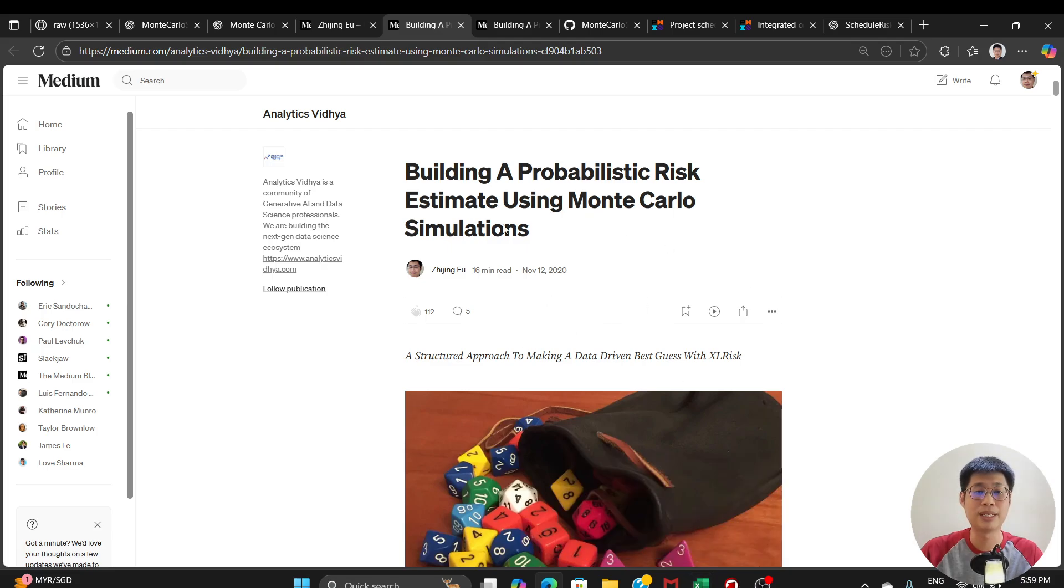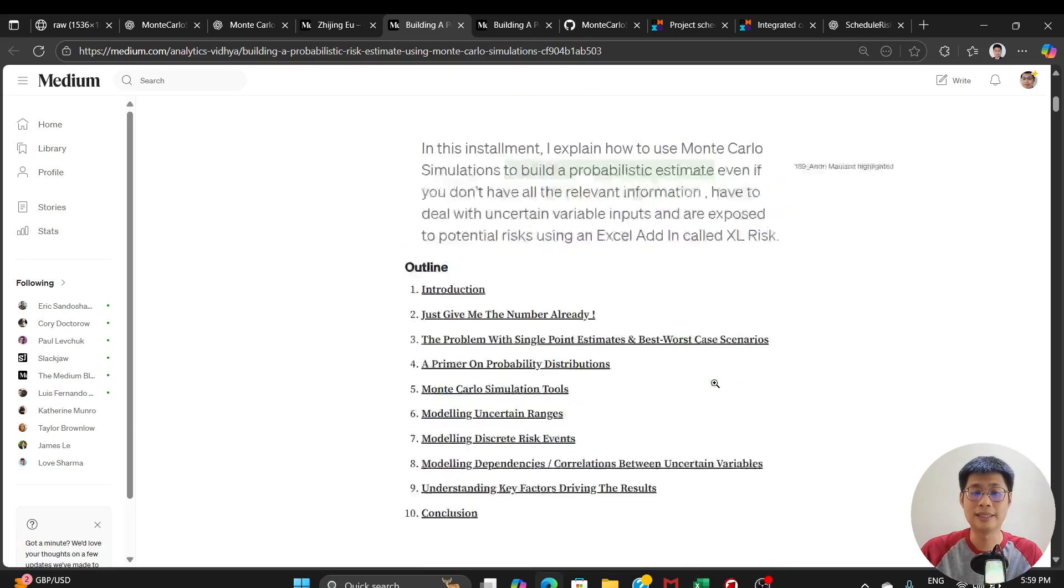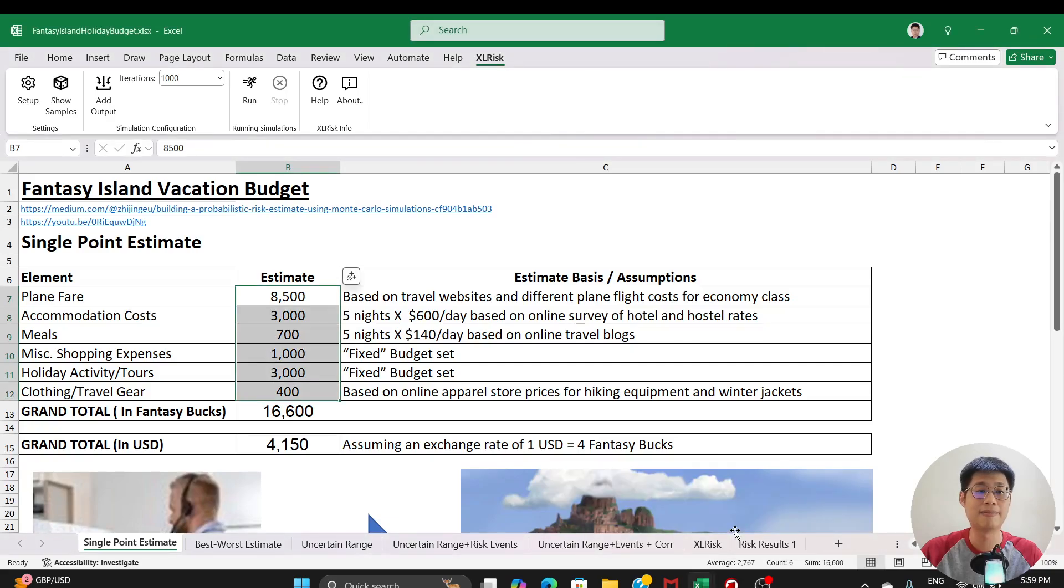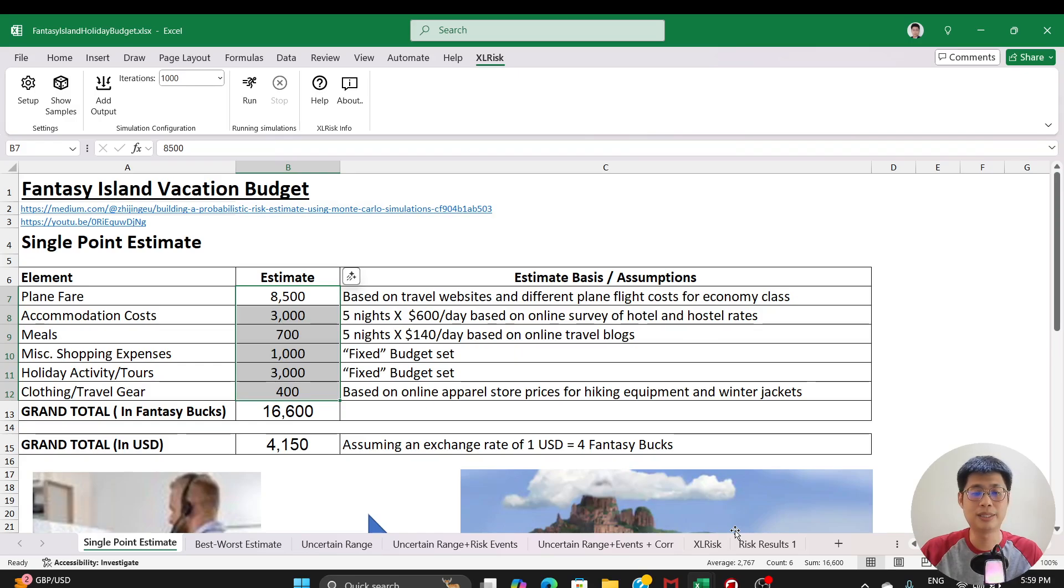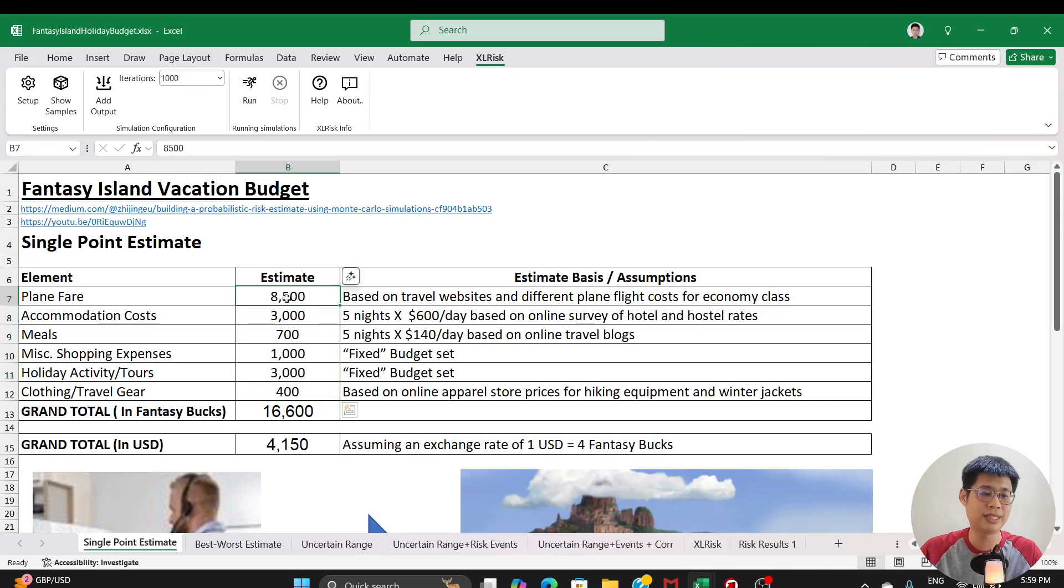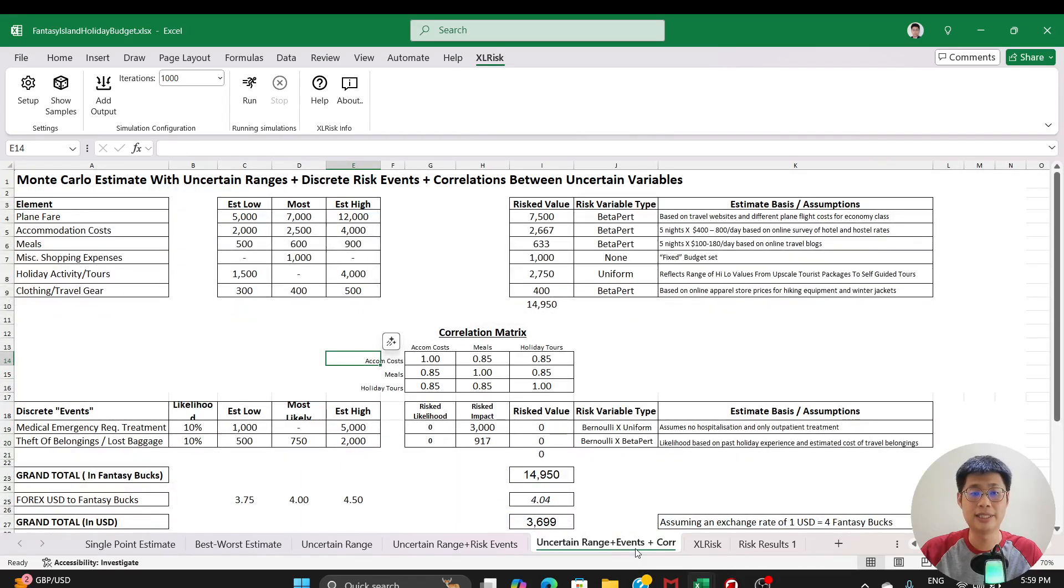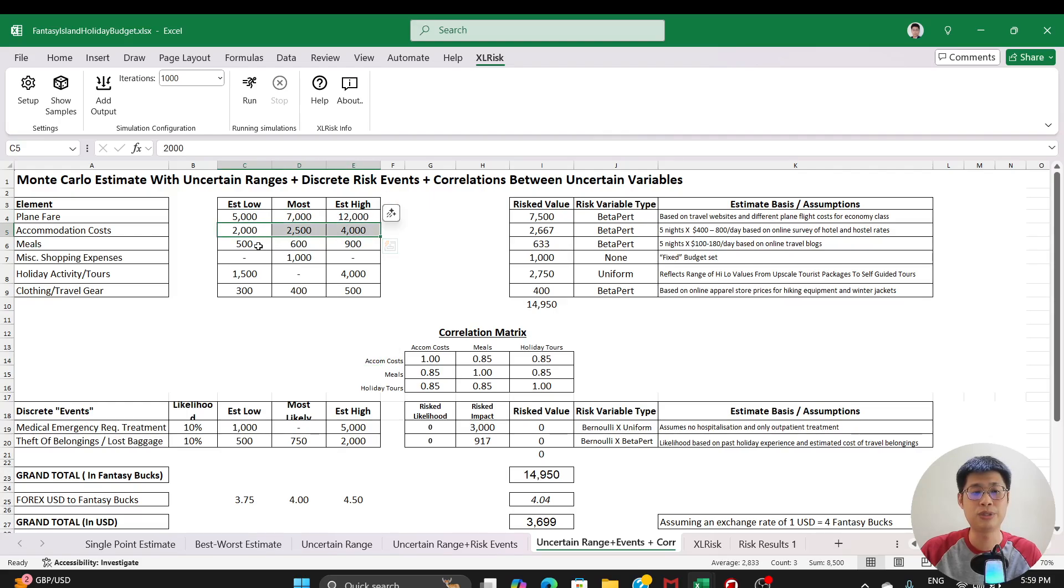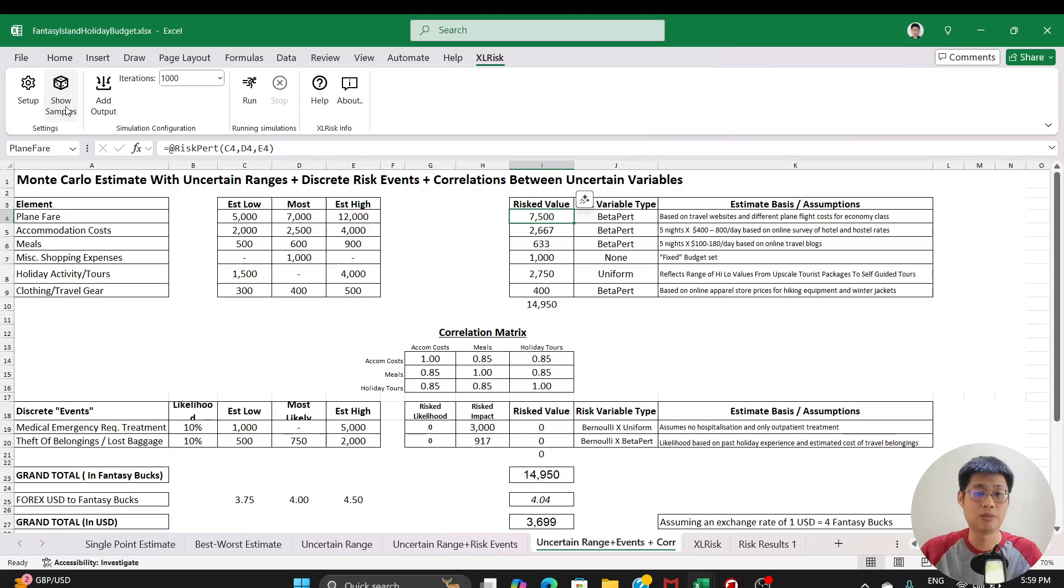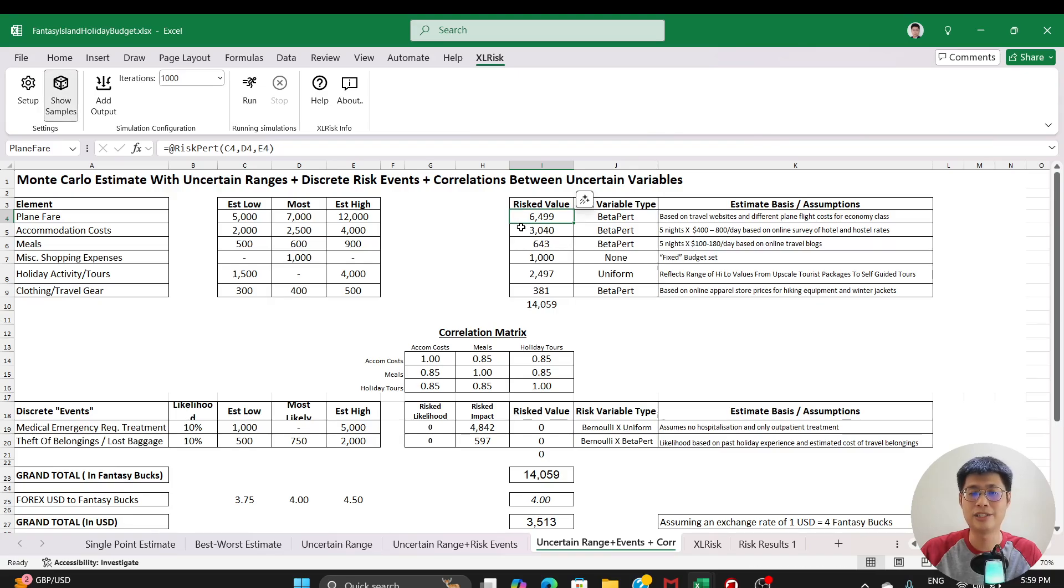So this particular tutorial was written and demonstrates something called Excel Risk. It is a really nice open source tool, which is an Excel add-in that allows you to do probabilistic estimates instead of just fixed numbers. So this is a contrived example where it is a vacation budget. Instead of having just fixed elements that don't change, what you can do with Excel Risk and in Monte Carlo simulations in general is you can define a range of values for the numbers you just saw a moment ago and you can run simulations where every time I click the dice, it's like you're rolling multiple dice and you're trying to see what each of those numbers come out as and then there's a grand total.